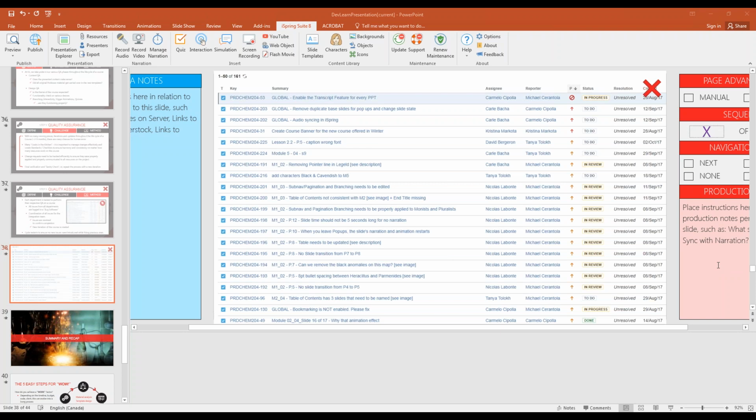There's a level 1, which is the more basic type. We have a level 2, which is more animated and fluid, which I would say this falls as a level 2. Then we have a level 3, which also adds gamification and leaderboards. We had roughly a budget of 1,200 hours to make this course. And we're a little bit over budget right now in terms of hours because this is also one of the first times this company is using iSpring for a course, so we're learning it, but at the same time, it's a learning curve for a lot of people in terms of e-learning where they come from Flash.